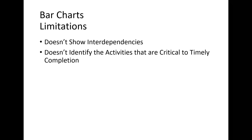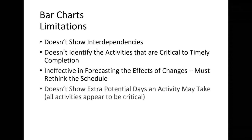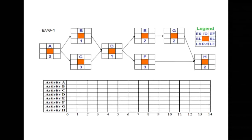The advantages of bar charts are that they are very easy to understand, provide visual clarity, and a relatively small size can display the whole project at macro level on an A3 sheet. They are the accepted default schedule, very popular in the AEC industry. Limitations: they are not ideal for showing interdependencies between tasks, and they don't clearly identify activities critical to timely completion. Experienced project managers often prefer scheduling using pen and paper at a macro level to avoid getting lost in software features.